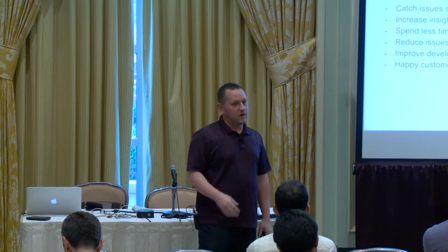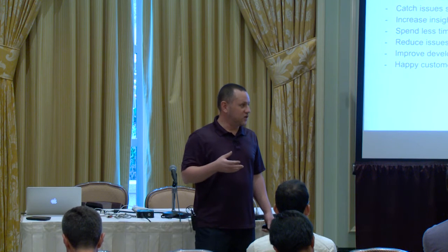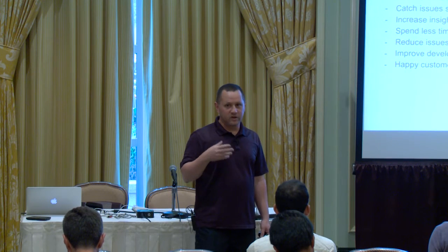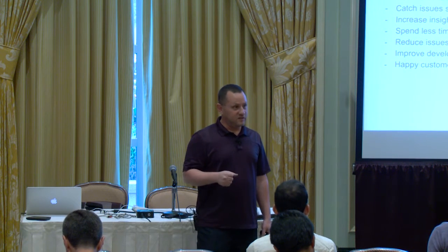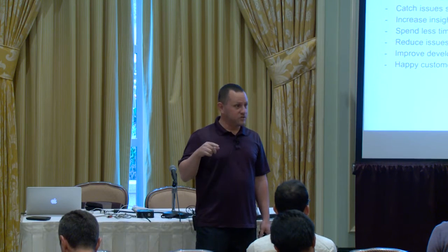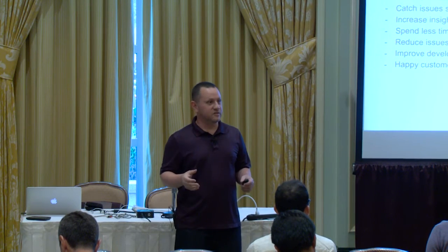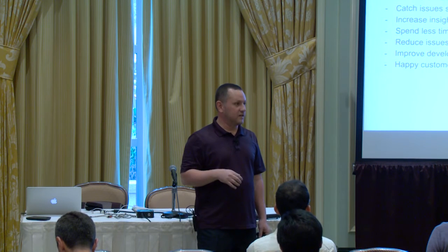That's right. So most development teams use some sort of agile, like Scrum or Kanban or Lean. And if they're using Scrum, they usually have what's known as a sprint burn down chart. So they try and accomplish some predictable amount of workload in a sprint. If the sprint is 2 weeks, let's say they accomplish 20, 30 story points as they're called. So you get a more predictable rollout to production, like you've said. And that's one more advantage.